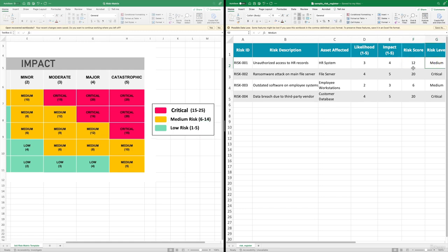The issue is that imagine you have 50 different risks, right? And you'll have so many different values: 1, 3, 5, 7, 20, 17, 22, all of these combinations. You don't want to have so many different categories. So what you do is lump these different scores into groups. For scores from 1 to 25, instead of having 25 different categories, we'll just have 3 different categories.